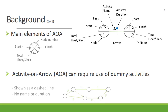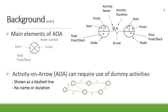The activity on arrow can require the use of a dummy activity. The dummy activity is represented by a dashed line and normally has no name or duration. In this example, activity D is connected to B, and activity D is connected with a dummy activity to activity A.